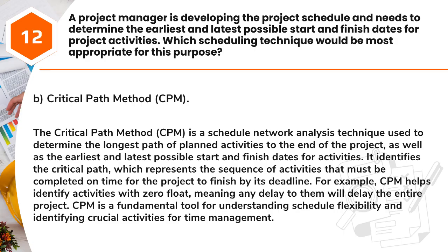For example, CPM helps identify activities with zero float, meaning any delay to them will delay the entire project. CPM is a fundamental tool for understanding schedule flexibility and identifying crucial activities for time management.